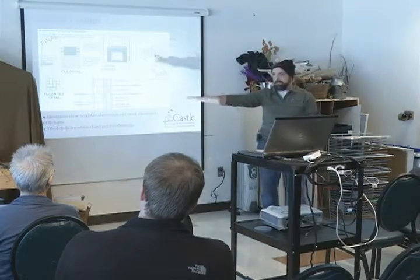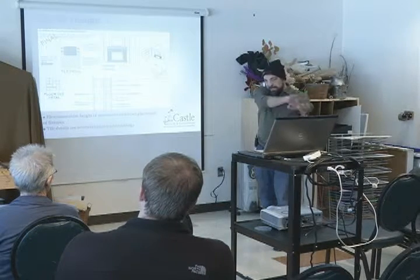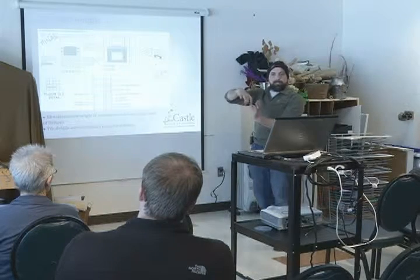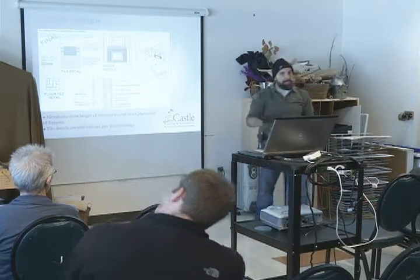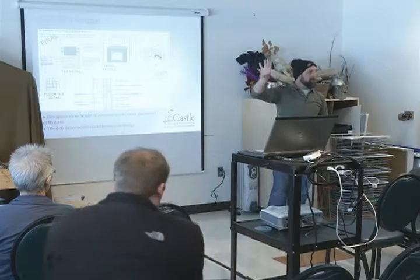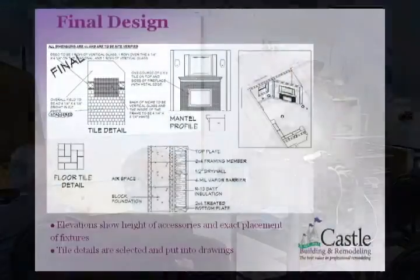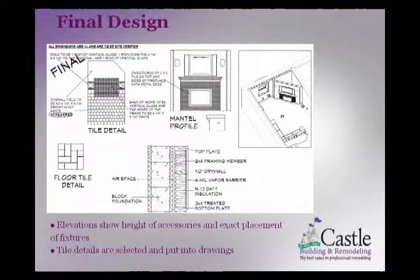The other one would be a tile wainscot on a wall in a bathroom where we've got a toilet paper holder, we've got that tile integration, we've got a couple of light switches, and just making sure that as each of these people come through and as this project develops, the first guy knows what the last picture should look like so that he can do his best to put his stuff in the right place and not have to redo it. So those elevations are really critical, even if they're more simple, because this thing happens in steps. And the first guy lays groundwork that can affect the last guy. And the joke in the industry is always that the painter will fix it, and that's not really fair to the painter.